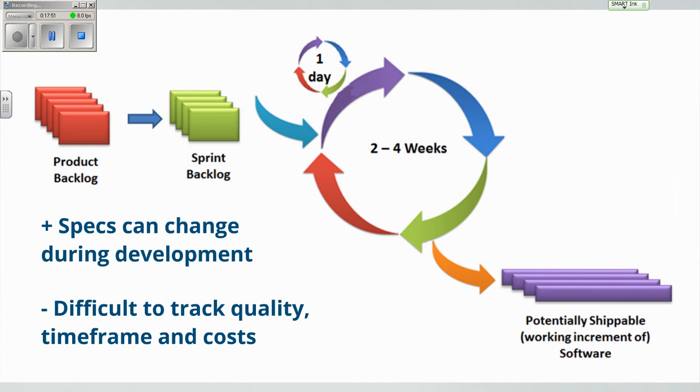There's supposed to be a Scrum Master who deals with the customer. The customer and the coders are not supposed to talk directly to each other. The coders are supposed to code. The Scrum Master is supposed to make sure that what the coders produce is what the customer asks. How the customer is involved will depend very much on the Scrum Master. It is just a methodology, so the way it's implemented can vary in different places.